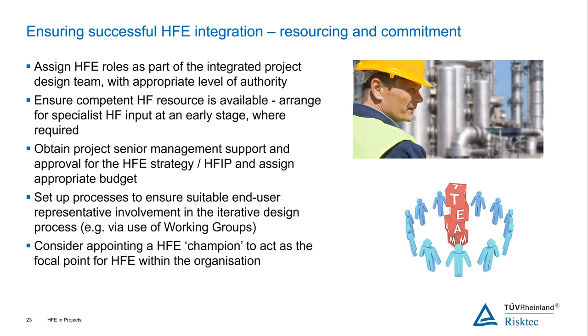And set up processes to ensure there's suitable end user representative involvement in the design process. And as I said, that might be the use of a working group. So if you set up a working group and you identify operators and maintainers and people that are going to be using the system or working in a new plant, find some representatives that are going to be available to the project, and they can take part in the working groups, and then they can be used as a pool to take part in design reviews, user trials, and for the HFE specialists to talk to and get their input. And it also means that there's buy-in to the final design, because they know they've contributed to coming up with that final design to suit what they need.